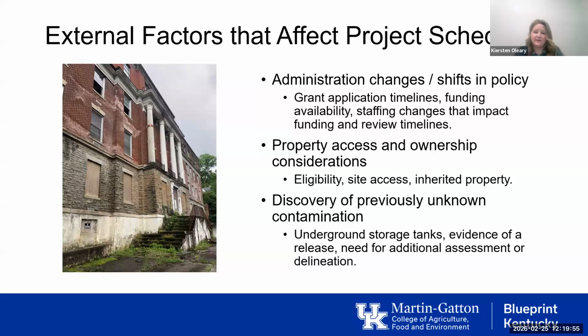And then one of the bigger things, something that we see quite often, is the discovery of previously unknown contamination. Once you get to the point of assessment or even cleanup, or just managing that contamination in place, if there are unexpected constituents of concern, like an underground storage tank or evidence of a release, there may be a need for additional assessment or delineation of that contamination that can take extra time.